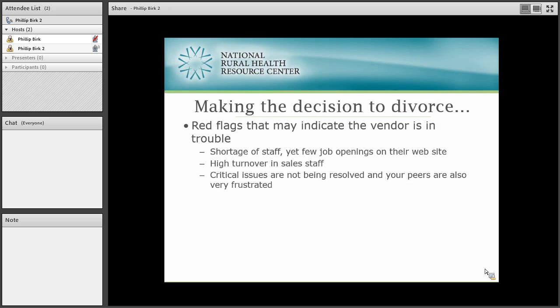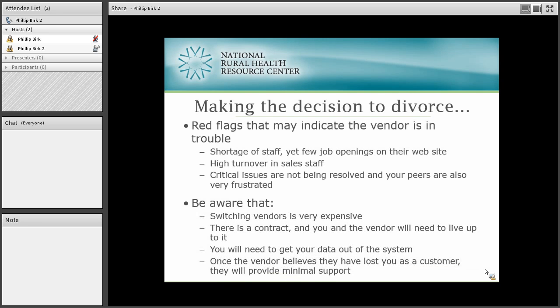If it's a chronic problem that you're not getting your things resolved, talk to your account manager, or even the support manager, and ask for weekly status meetings. If you have an issues list that's getting long and things are not getting resolved, that's time to put together a weekly status meeting. Get them to focus on it, and you to focus on it simultaneously and discuss where these issues are going.